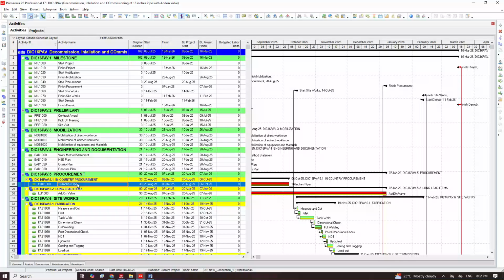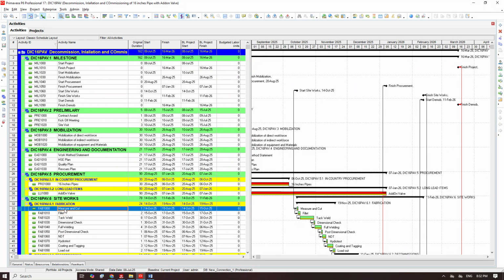All right. So what we normally do in procurement, depending on external factors, is we always put buffer. So those buffers will help you. Those buffers are just additional days that will help you to manage all those risks. Then if you are lucky enough, everything goes fine, good. It comes early before the timeline expires, good and fine. Then if there are delays, you use your buffer to accommodate those delays. Please take note of that. It's very, very important. And adequate tracking is also important.